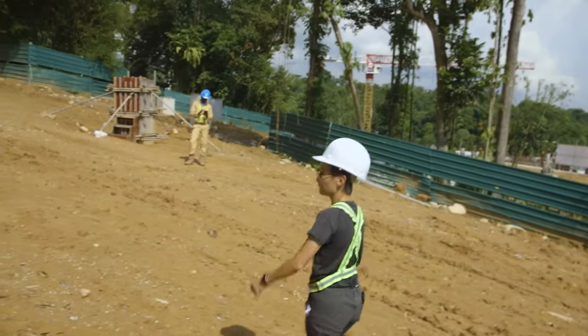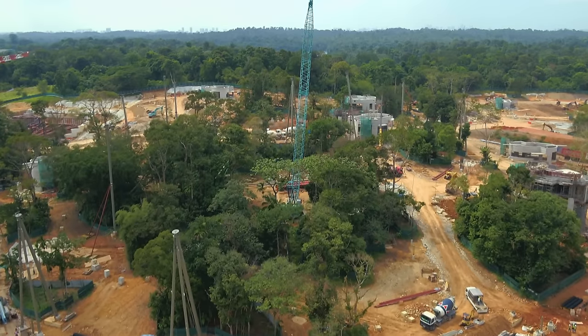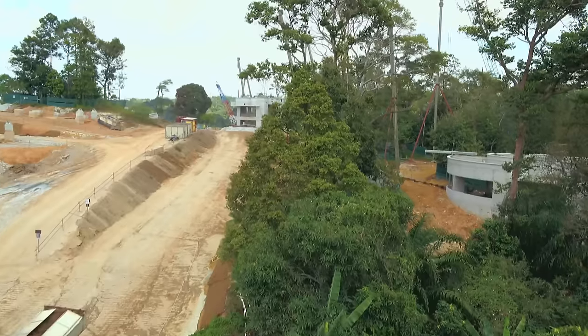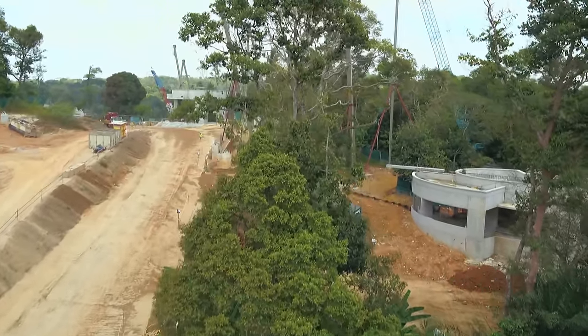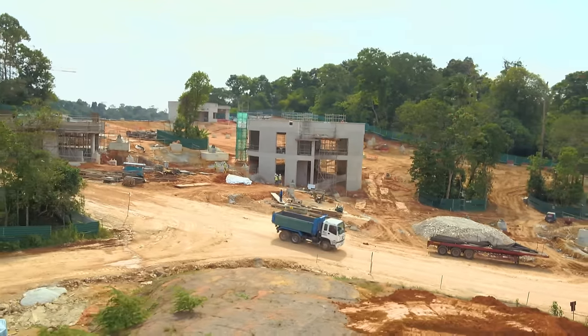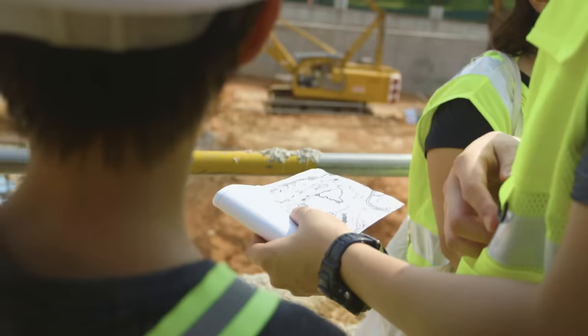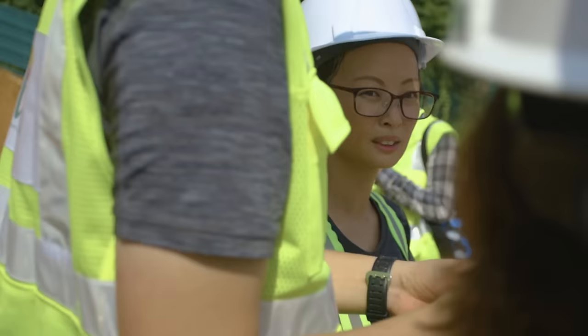Heart of Africa will be the first aviary that we start installation. This is also our most challenging aviary because the number of tree protection zones is also the largest. The topography is very varied, so the working space is very tight. It's true that it is going to be a bit challenging for the installation of the columns, the aviary structures